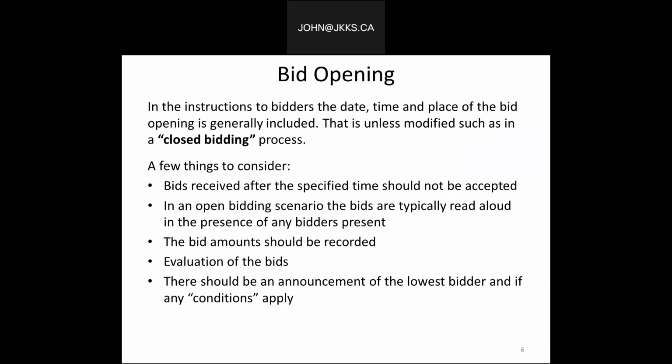And certainly there has to be an evaluation of those bids. And there should be an announcement of the lowest bidder and if any conditions do apply. So remember, if stated, it may indicate that the owner has the right to accept any of the bids or all bids, or the right to even reject the bids. The bids must be carefully reviewed to determine that all conditions have been met. During the bid opening period, it is best not to give the impression that the low bidder will automatically be awarded the contract on the date of the tender opening.